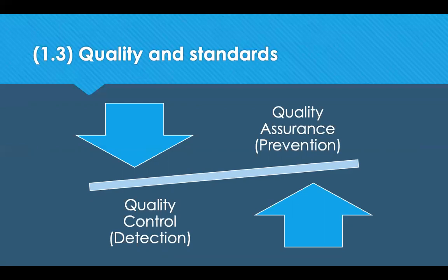They work together. Now, quality assurance is a set of planned activities that check to ensure that products or services fulfill the quality requirements. So your quality assurance strategy should be designed and agreed at the very start of a project in order to try and prevent defects from occurring. This is about getting it right first time. It involves regular and constant inspections of your product or service.